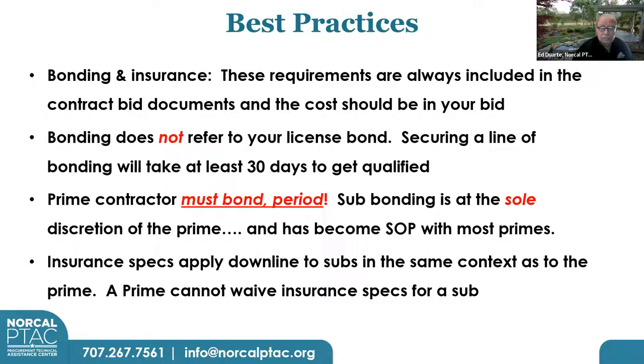Now, since the early teens, 2010, 11, 12, bonding of subcontractors has become more prevalent in the industry because of the high risk and the high probability that we subcontractors fail during the course of construction. That's really too bad, but it's a question of risk mitigation, and bonding of subcontractors by prime contractors, you have to remember, is at the sole discretion of the prime.